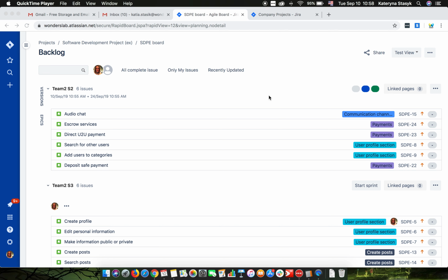So this one is about how different teams can work on the same product backlog. Often we have several teams if the product is really big, and according to Scrum rules, your team should be either five people or less. Of course, there are sources which say that there should be 9 people, but personally, I follow the rule that the team should not be more than 5 people, and it needs to be feature teams.